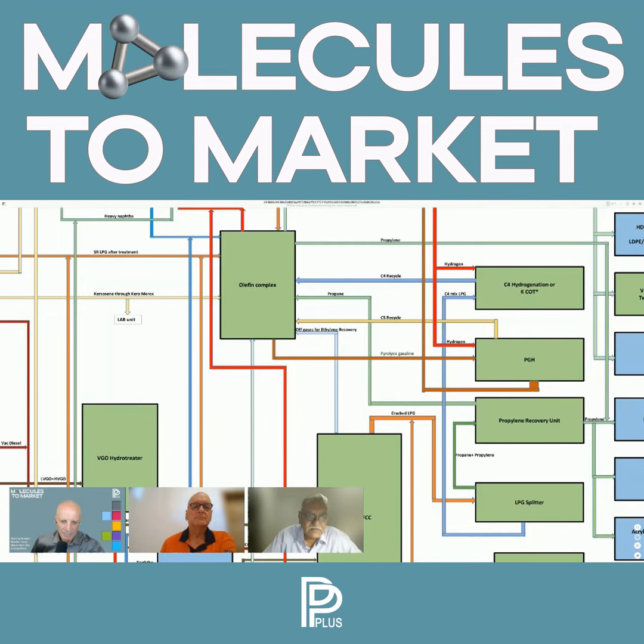So there's a lot of time which is taken because I will make a tender document, I'll float it, I'll receive bids, I will technically evaluate them. There will be question answers. They'll be sitting across the table, closure of the technical document, then the commercial closure of the document, finally the price opening, selection of the L1 agency, and awarding of the EPC contract. This is a time cycle. It takes 6 to 8 months, sometimes even 10 months to award an EPC contract depending upon the size of the contract and such. So this is a time cycle.